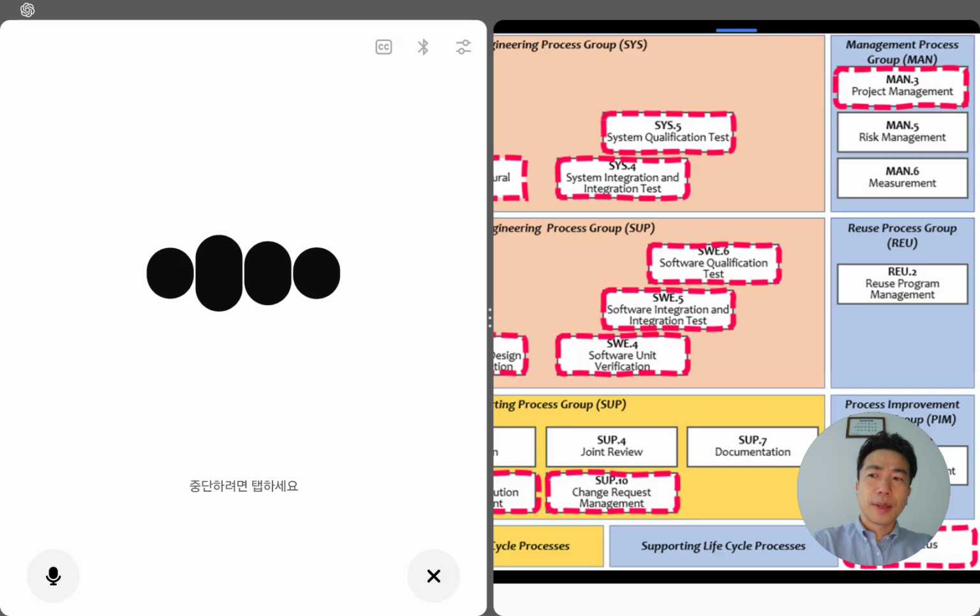1. Project scope and tailoring are defined. 2. A project plan exists: schedule, resources, budget, quality activities. 3. Responsibilities are assigned, RACI or similar. 4. Risks and opportunities are managed: identified, owned, tracked. 5. Progress is monitored versus plan with objective data. 6. Stakeholders are informed: reviews, minutes, actions. 7. Changes are controlled and baselined. 8. Lessons learned are captured for next projects.